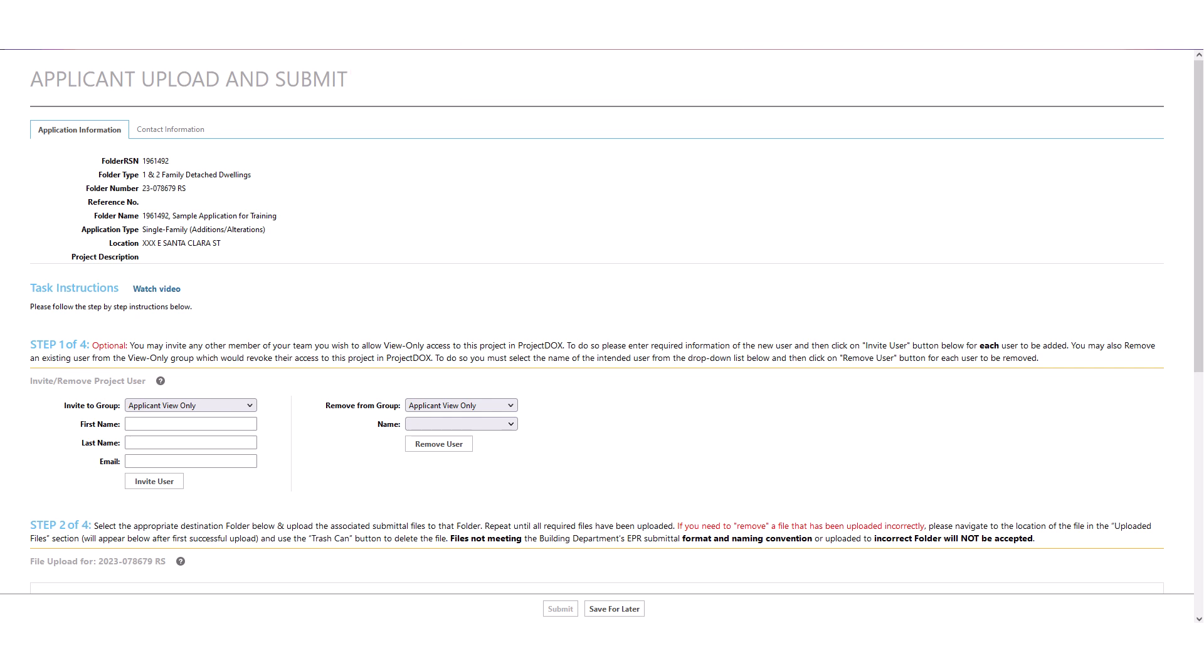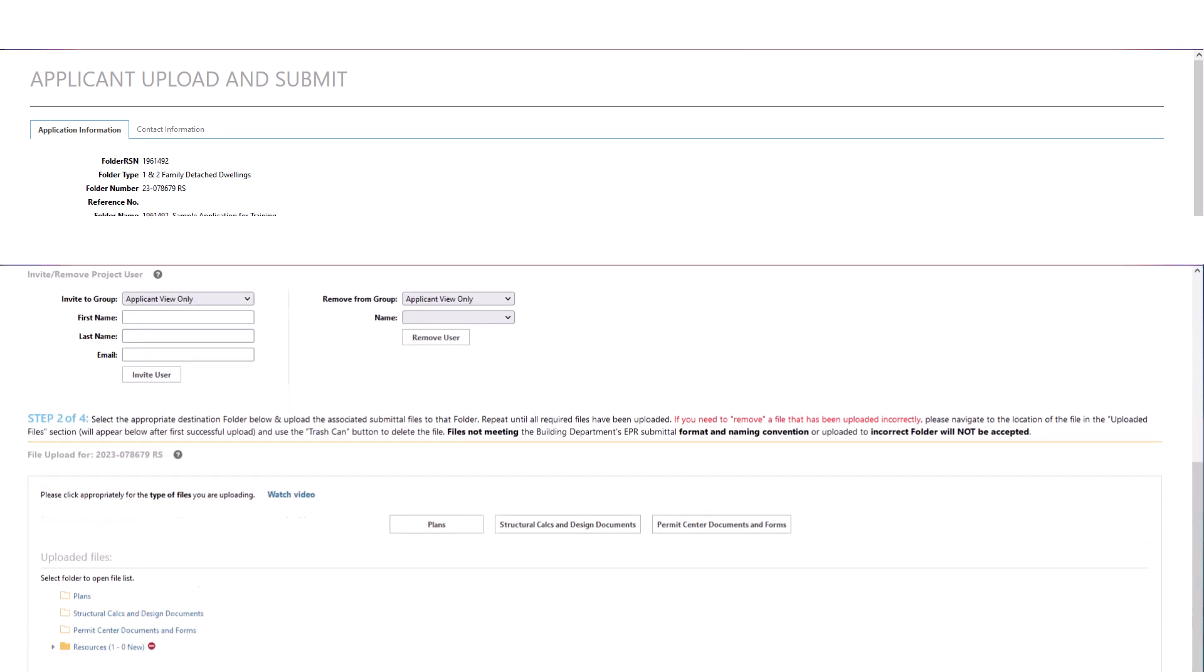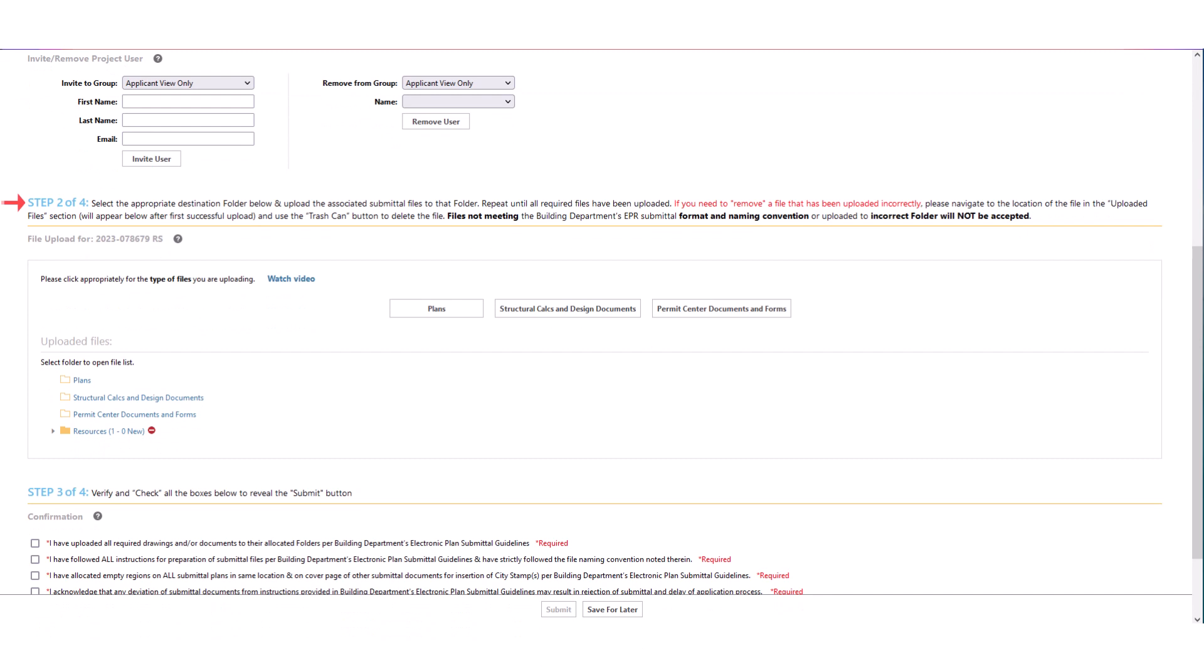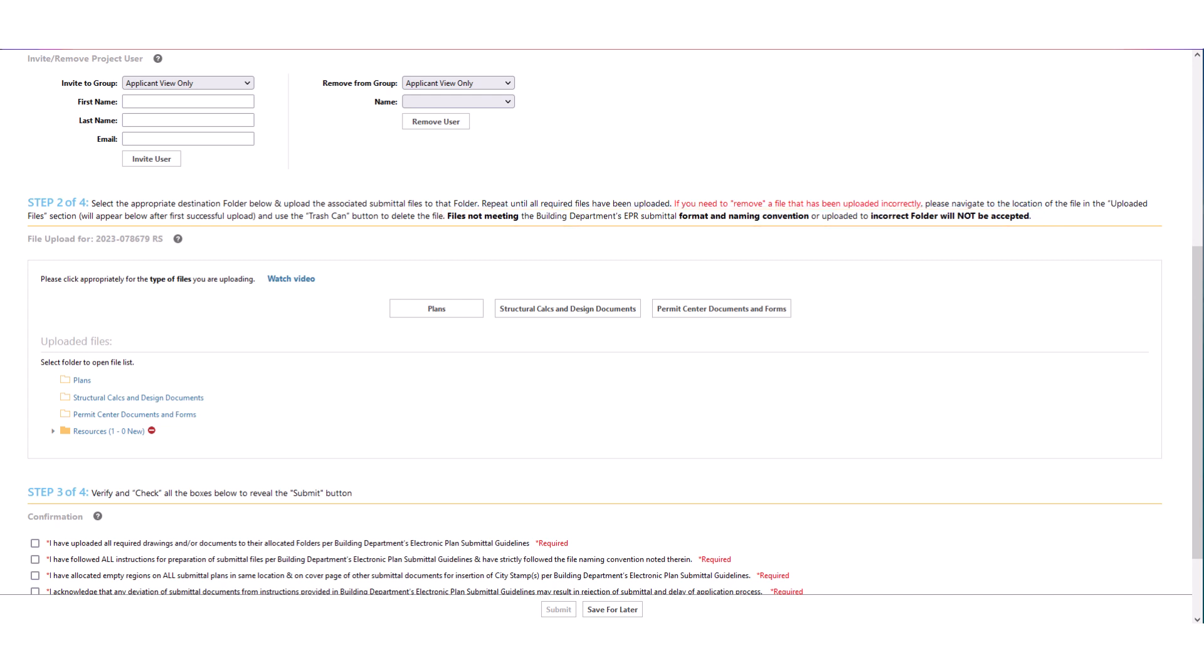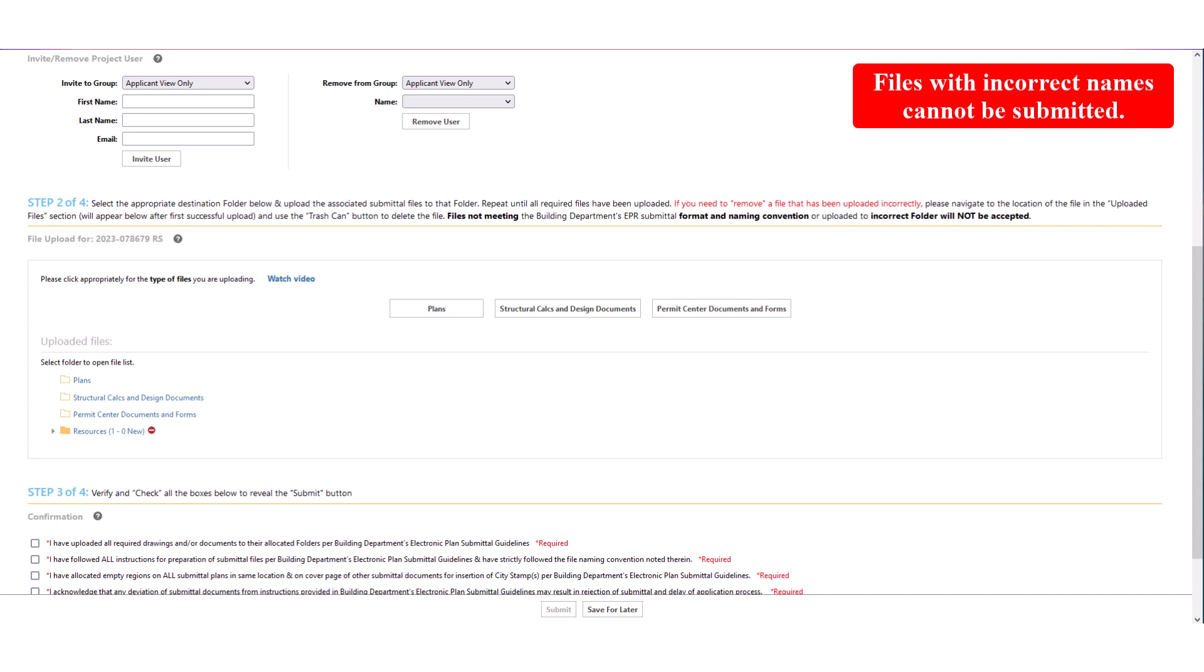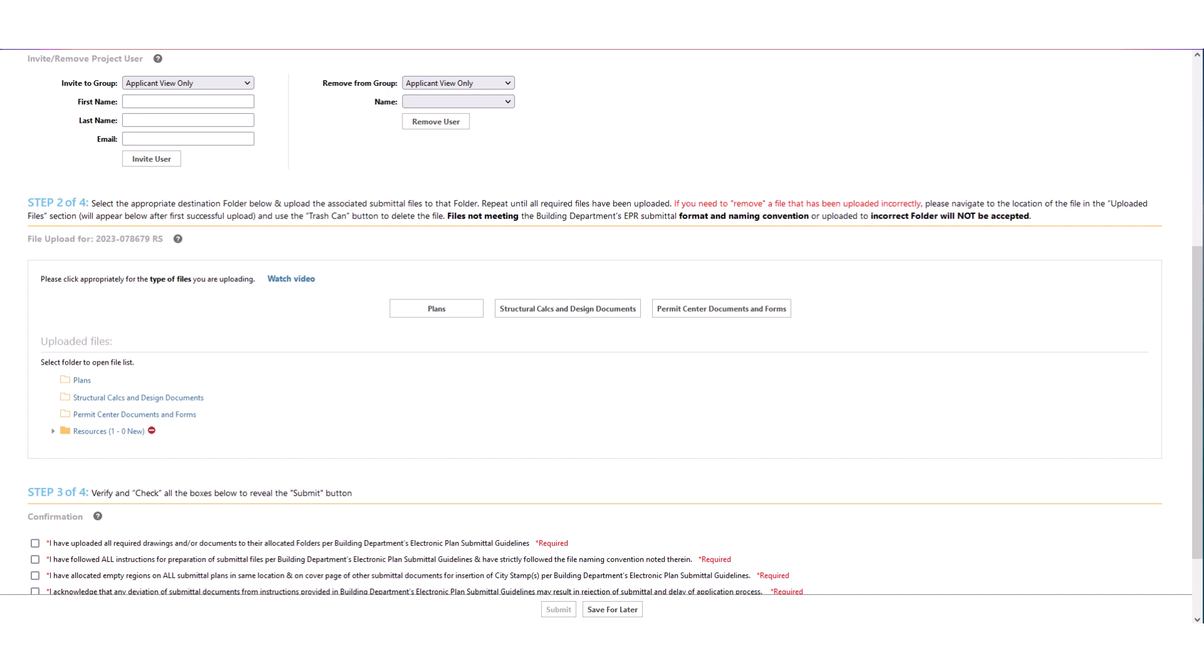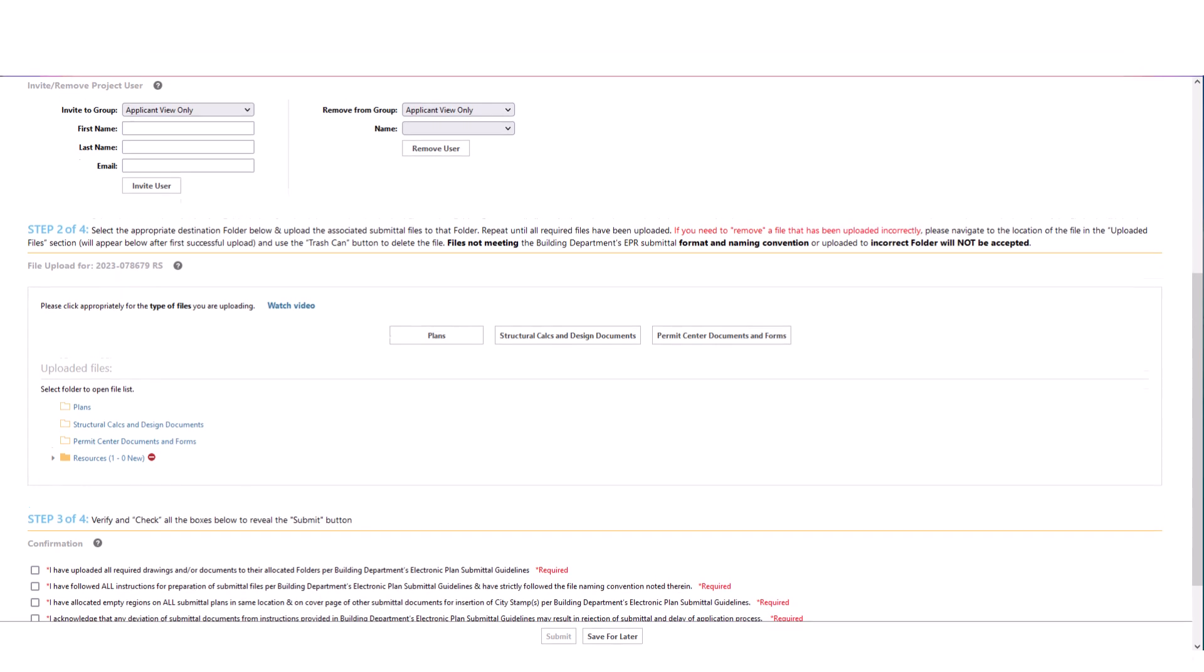Scroll down to Step 2. Step 2 provides the ability for you to upload the submittal documents for your application into Project Docs. All files uploaded to Project Docs must meet the building department's electronic plan review guidelines. Files with incorrect names cannot be submitted. An Excel spreadsheet to facilitate conformance with file naming convention has been provided along with the application. To access this file, close this e-form.